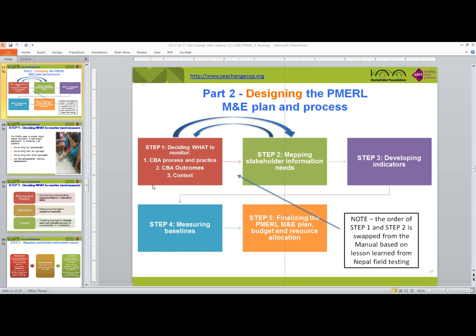What I'm working on right now is I feel that if you have your climate vulnerability and capacity assessment, that will give you the very much needed situation analysis. To get a climate vulnerability and capacity assessment, there's a whole bunch of PRA tools you can go through. You do mapping exercises, both in terms of what the risks are and what the different assets or livelihood resources you have. You do Venn diagrams to figure out who the stakeholders involved are, and then based on that you extract your information that pertains to livelihoods and disasters, also what shocks and stresses you're dealing with.